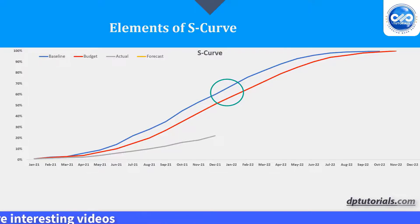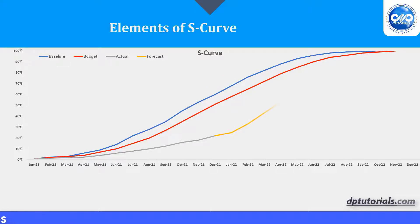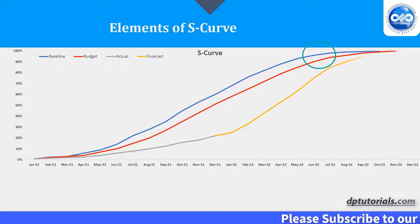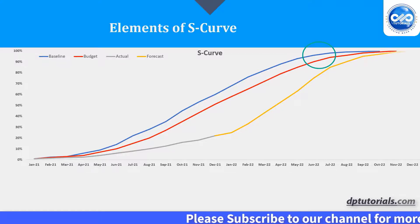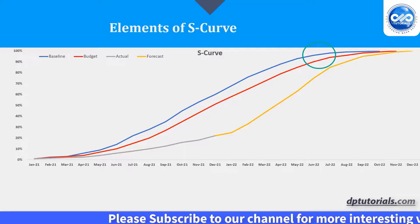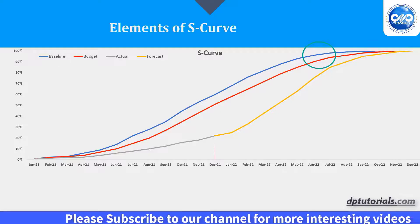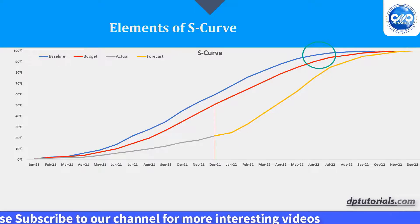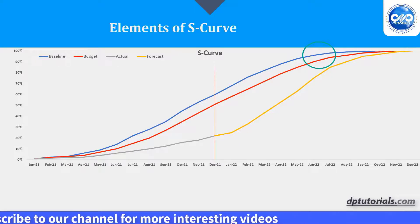After the point of inflection, the growth begins to plateau, forming the upper part of the S, known as the upper asymptote and the mature phase of the project. This is because the project is mostly finished at this point and is winding down, with typically only tasks such as finishing touches and final approvals remaining.